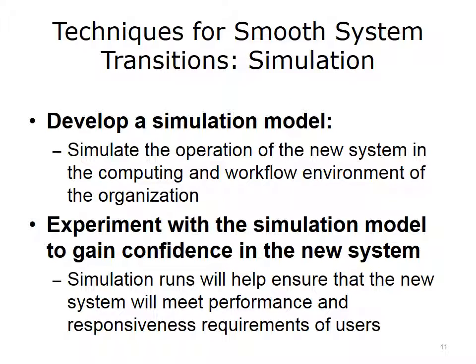One technique to help ensure a smooth transition is simulation. The idea is to have a simulation that allows you to experiment with the effects of the new system and processes and determine its ability to handle volume and performance requirements. If you're doing a simulation, be sure to involve end users when you can. Many institutions have developed simulation labs where end users can simulate new processes in an environment that mimics the work environment. If the institution has one of these labs, use it. If not, consider creating your own environment — use a room where you can bring staff to help them visualize the new work environment, get actual patient charts or orders, and have staff simulate working in the system. These exercises and simulation runs will help give you confidence that the new system will meet performance requirements.